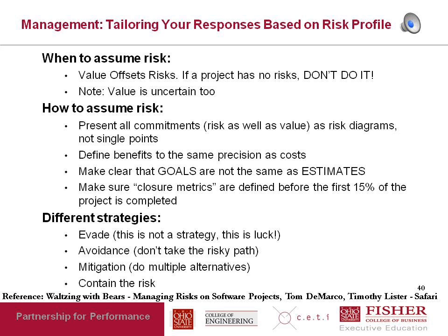However, the rule of thumb is that by the time the first 15% of the project time is over, you must know what the problem is and how you're going to solve it. In other words, the elaboration phase of the project must be done by the time you've completed the first 15% of the time allocated to the project. That way you have enough time to deal with any risks that can take place. So you have 85% of the budgeted time left to deal with any problems.